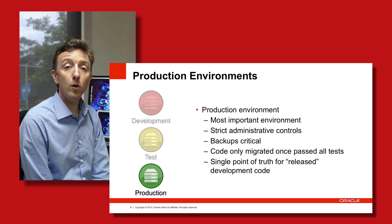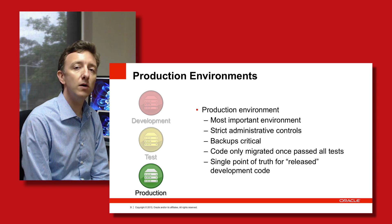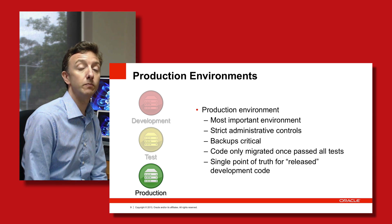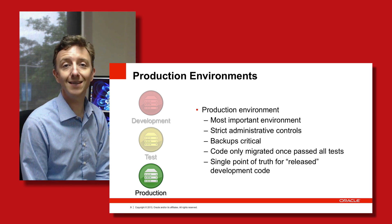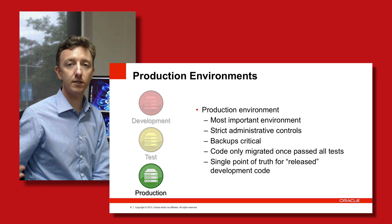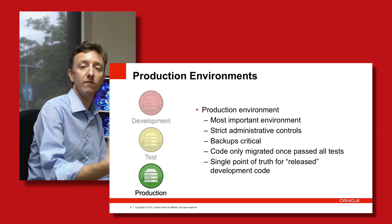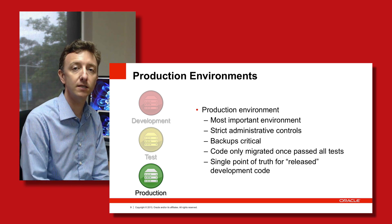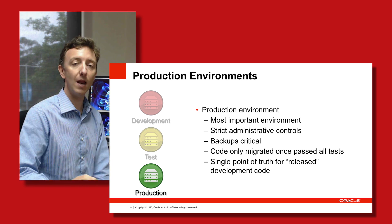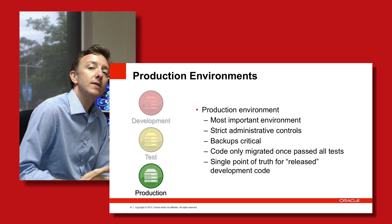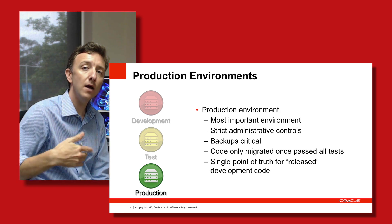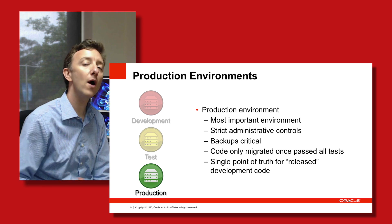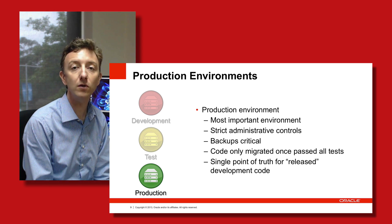Finally, there's the all-important production system, which is the most critical system within your business. When you first start out with a greenfield or bespoke ADF development, you don't really need to have a production environment yet, so the databases and WebLogic server infrastructure may not yet need to exist. But this does need to be part of your plans. When you start your ADF development, you really should start thinking about putting the test and production systems in place well before the developers actually get to releasing their code.